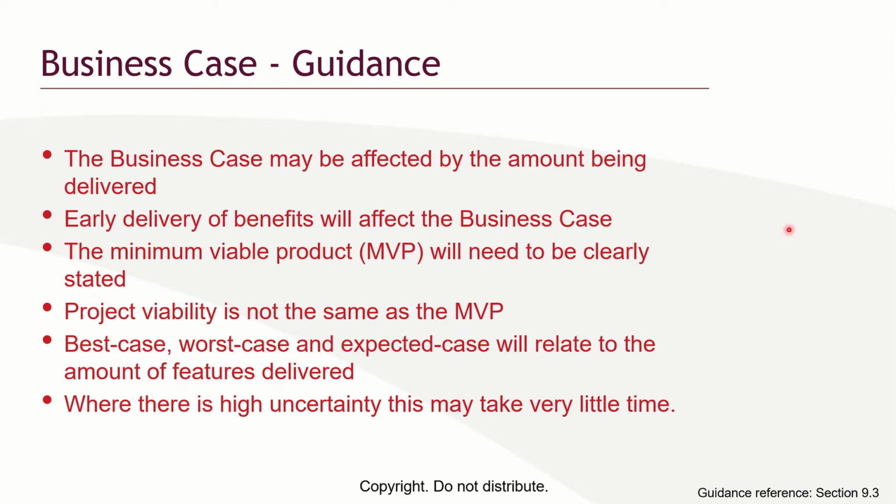What is the meaning of best case? Best case means if the project is executed the way we plan, if all the resources are available, this is the best product we can get. This is the future we can get, the best case. The worst case is if we did not do the project, this is what will happen to the company. Expected case is if we do, for example, 50%, what do we expect to get? What are the features that are delivered? What is the best future that can be delivered? What is the worst and what is the expected one?